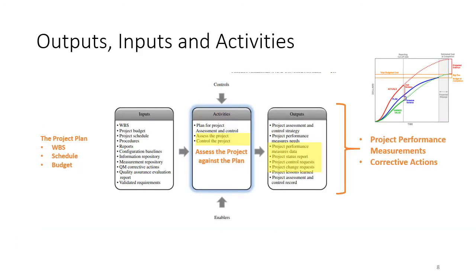The inputs to the process are the work breakdown structure, the schedule, and the budget. Using that information, you assess the project against the plan and generate project performance measurements — as shown with the earned value chart. When things are not going according to plan, you take corrective actions.